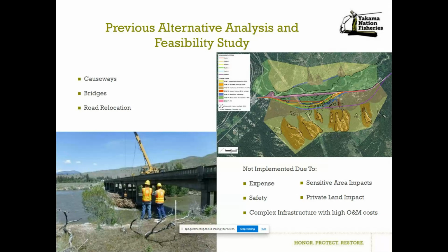So there are issues with the current culverts in terms of their design life. I don't know what the costs of those culverts were, but I can also say that there was an analysis done on culverts in the area that we're proposing to realign the roadway, and it was not supported, both from the hydraulics and from the underlying land managers, except for just a backwater alcove culvert at the lower end, which wouldn't have nearly as much habitat value as creating a flow-through scenario.